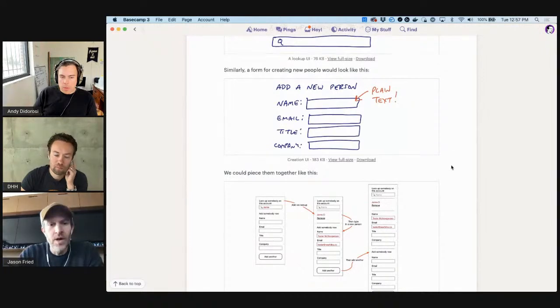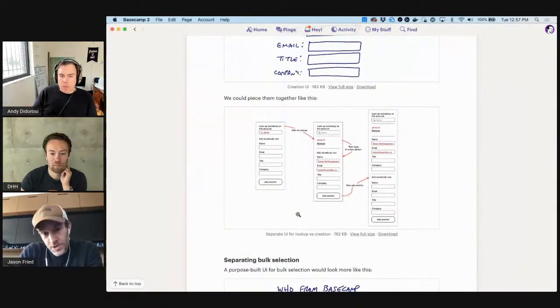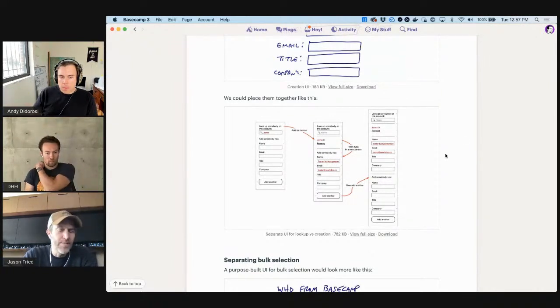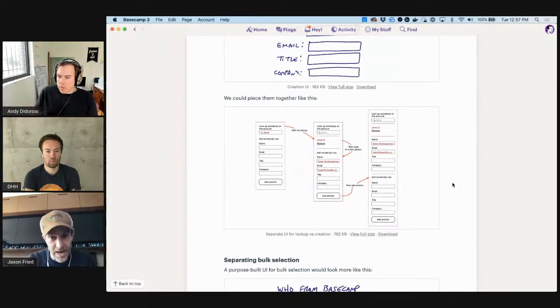Lo-fi. Now, these are called breadboards, these are not wireframes. This is not how the UI is supposed to work. This is just a series of fields and steps with some things. So Ryan went into this kind of mode because for him, it was easier to think this through. But this is also really fast, and it's not a wireframe. It's not intended to be designed. There's no understanding between the team members that this is a design we're looking at. These are just the fields, the information that we want to deal with in different scenarios, okay?